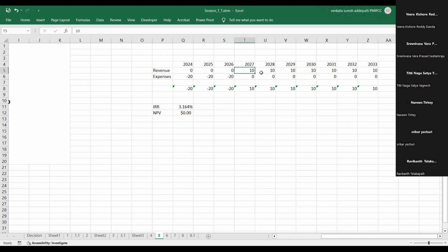Now, just for the sake of discussion, let's say we bump this to 100K. Now you look at this here, right? And I change this back to, let's say, 10%. This is telling you that for this cash flow profile, your return is 62%. And at a 10% cost of capital, the project is valued at 104K.